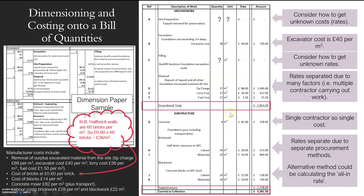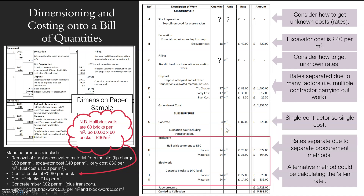Once I've done all that, I've got my groundwork total. Then I move on and look at concrete — I've got 3.94 meters cubed of concrete over here. Brickwork and blockwork is measured in meters squared.